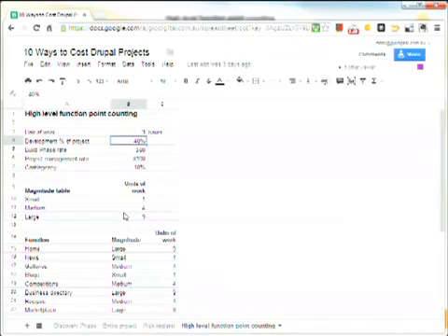Because we've worked out that we've got pretty good development capabilities, and the rest of the phases, according to our methodology, are really going to take about 60% of the project all up, and 40% development. So that's the extrapolation to the rest of the project. You might decide to base it on something else and extrapolate based on different figures, but that's just an example.